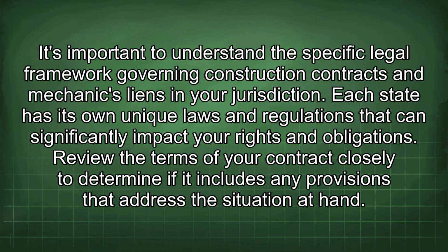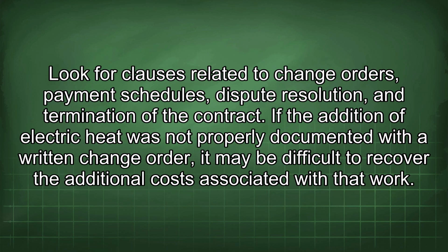Review the terms of your contract closely to determine if it includes any provisions that address the situation at hand. Look for clauses related to change orders, payment schedules, dispute resolution, and termination of the contract. If the addition of electric heat was not properly documented with a written change order, it may be difficult to recover the additional costs associated with that work.